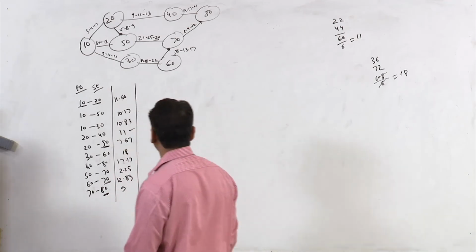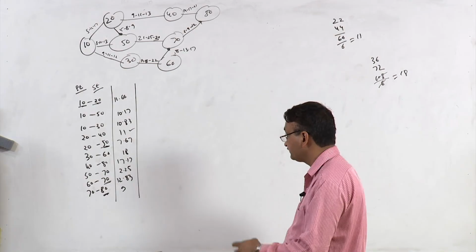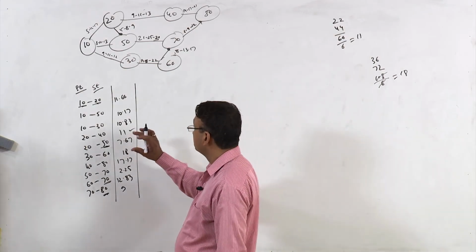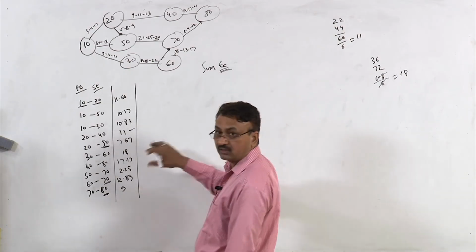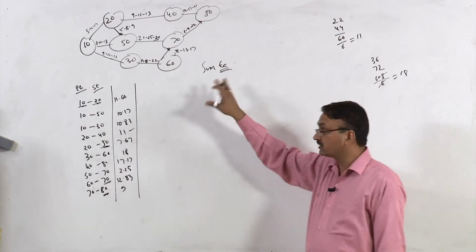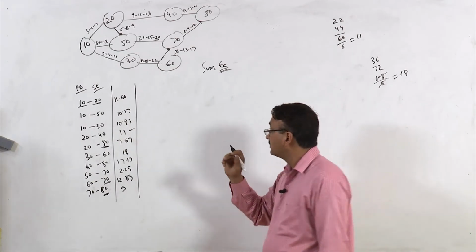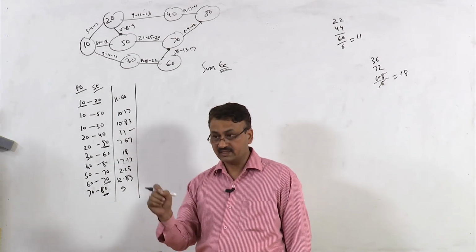So this path is the critical path. So you can do two things at this stage, either calculate the summation of TE for all 4-5 paths for this question, and then take standard deviation and then variance, right.